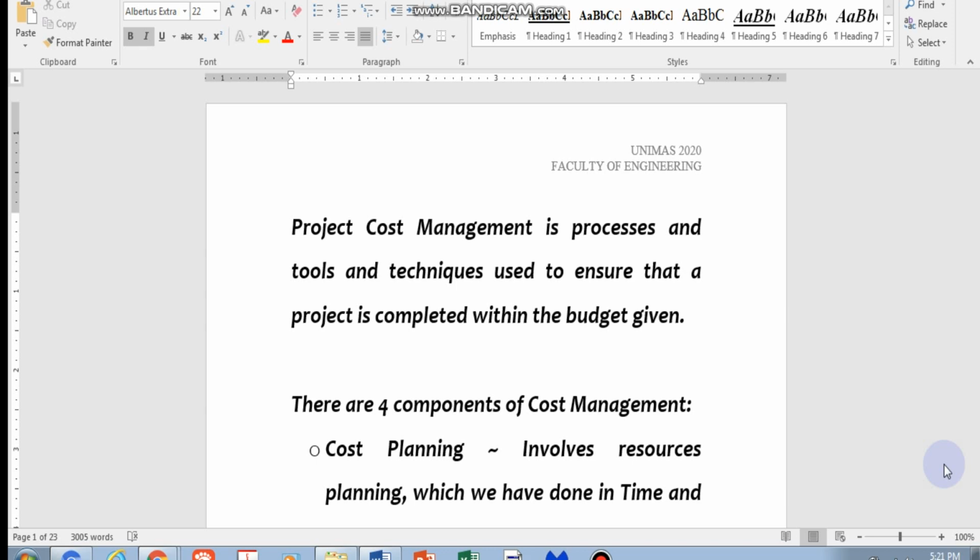Costing technique, like I say, is the basis of everything. So we apply costing technique to doing estimates, and then we will come up with the approximation of the cost of the project. And if this estimation is approved by a client, essentially that will be turned into a budget for the job. So when we say in engineering to meet the budget or to finish a job within the budget given, we are essentially saying that the estimate has been approved by the client already, and you need to stick within that particular budget.